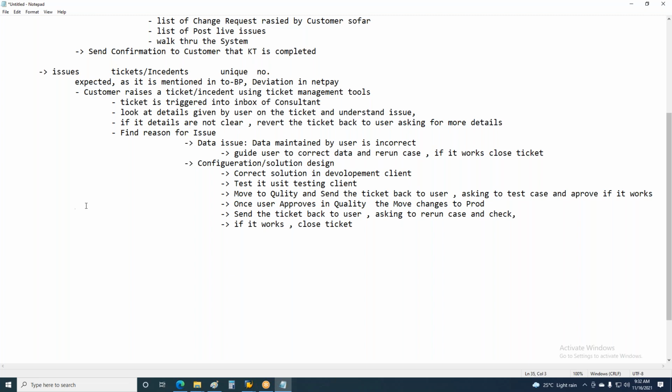Got it, sir. Generally the project manager will maintain the track of it. Every week he will raise the issues that came to our team and how many are fixed, how many are pending. If there is an issue which is taking more time, he will focus on that issue and start discussing it. He'll ask you, do you need any support to fix it? Are you going to fix it? How many days are you going to take to fix it? If any issue is going to be delayed, the manager is responsible to get it fixed, providing some additional help.